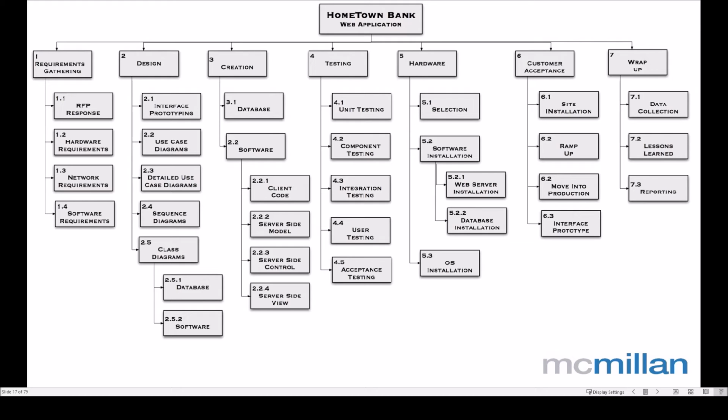So for us in this case, and in the context of what I talk about, where we're ultimately responsible for all of the project, our decomposition or breakdown of task activities would go down to the level of detail that we need so that we're clear about what needs to be done. So we break down, as we would with this diagram, all these deliverables, activities and tasks. We would consult as part of that process. We'd talk to people, we'd talk to the project team if they've got any experience. We'd have a look at any historical documentation. We might consult outside of the organization, to industry.